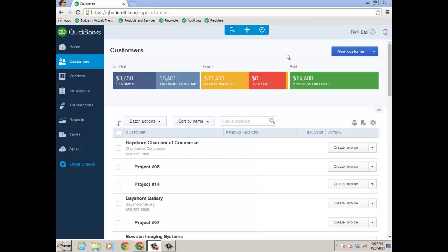So this video focuses on that and the things you need to set up in order to make that work in QuickBooks Online Plus. And you do require QuickBooks Online Plus for a couple reasons. Number one, for the estimate to actual, we're really going to start with a budget. We are going to use an estimate. I know estimates are in Simple Start, Essentials, and Plus, but the budget's only in Plus.